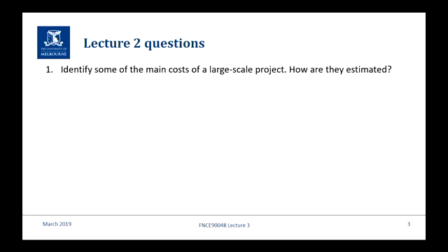How are the costs estimated? I guess the best thing to do would be a methodology. How the final thing looks like, and then go backwards. In terms of even the tiniest little things, bolts that I would need to make this thing work. Yeah, that's a good way of thinking about it, that you look at the big picture and you then break it down into all of the components. That's right. Even down to the bolts, I suppose. You probably need a lot of bolts in some of these projects.